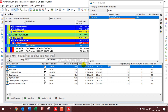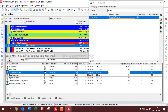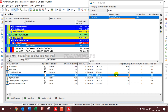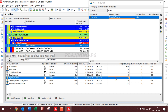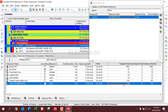We will now change the budgeted units. The cost of this activity per the contract is thirty-eight hundred dollars. Drivers need seventy units, Dump Trucks also seventy units — these drivers are for the dump trucks. Loader requires thirty-five hours, Operator thirty-five hours, Traffic Safety Crew one hundred and five hours, and Unskilled Workers one hundred and five hours. Resources are now assigned to this activity.